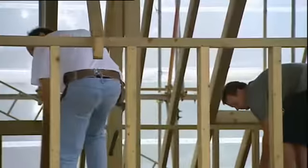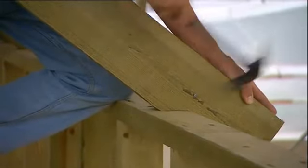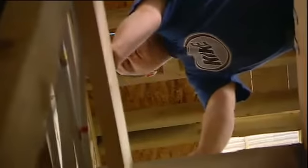Now desperately needing to cut costs, Rebecca has decided to get the project finished as quickly as she can. She takes the radical step of employing all the different trades at the same time, but the site becomes bedlam. There's lots of people around. In fact, it's quite hard to keep tabs on everyone. There's more and more people arriving each day. I've got electricians here, first fix plumbing, I've got windows going in, got a couple of window guys here, chippies, still got the builders here, doing brickwork, putting the roof timbers up. So it's really getting quite busy here on site.